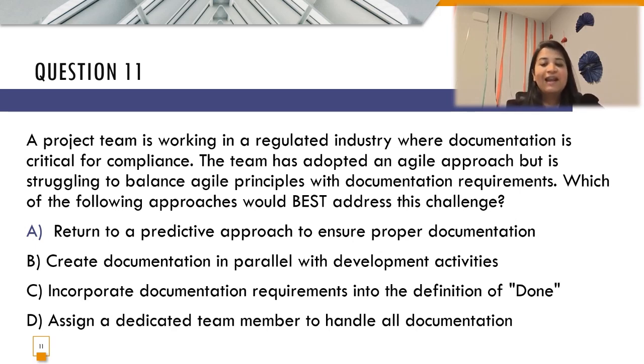And now coming to option C, which is to incorporate documentation requirements into definition of done, which is typically the right option choice. Before the team says that we have developed working software, they have to make sure that it is also documented properly to mark it as completed.